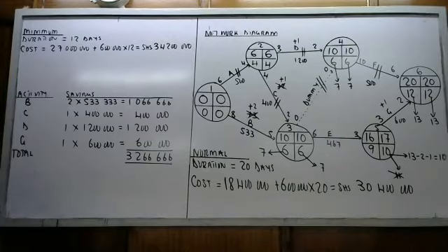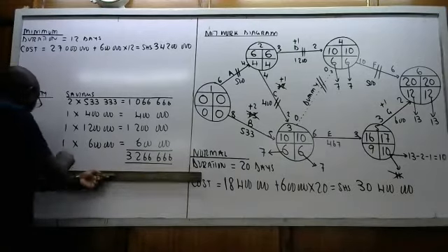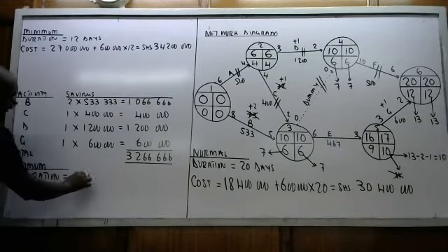Okay, I hope we have agreed that. We have agreed to that. So if we have agreed, then we can now come and give optimum. Optimum is the most economical. So we will say duration is 13 days.